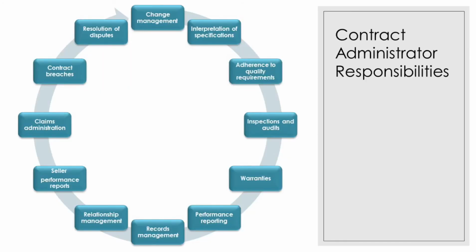So when closing procurement, there are certain duties the project manager and their team have to do, like product verification, and this includes checking to see if all the work is done correctly and satisfactorily; negotiating settlements, including final settlement of all claims, invoices, and any other related issues; financial closure, and this involves making final payments, completing cost records; procurement audit, updates to records, and final contract performance reporting.